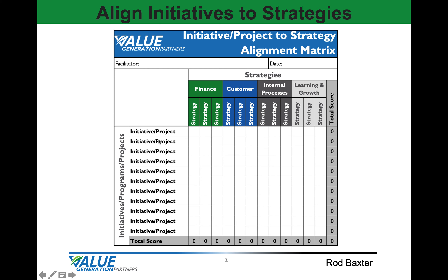We'll then correlate or align each initiative and project with each strategic goal and objective. We'll give it a numerical strength score of 1 for low and 5 for high, entering a score of 1 through 5 for each initiative or project relative to each strategic goal and objective.